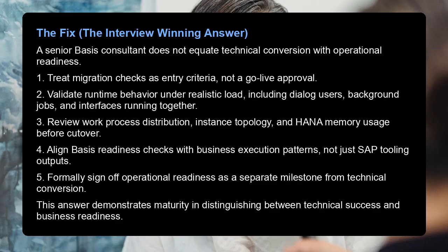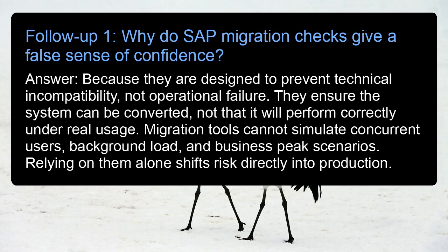Formally sign off operational readiness as a separate milestone from technical conversion. This answer demonstrates maturity in distinguishing between technical success and business readiness. Follow-up 1. Why do SAP migration checks give a false sense of confidence? Answer: because they are designed to prevent technical incompatibility, not operational failure.